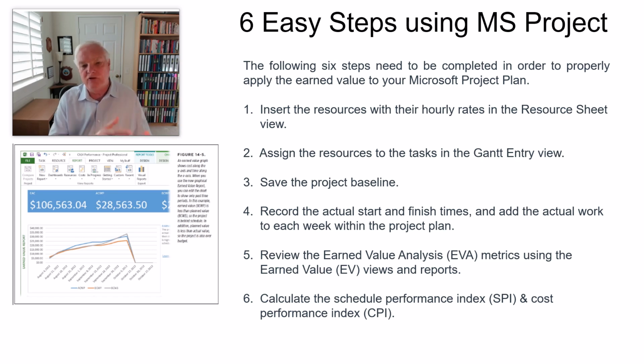Then, as you're moving forward, you record the actual start and finish times of the activities and the actual work to each week within the project plan. That gives you then the ability to review the earned value analysis metrics using the EV views. So you can go to views and you will see an entire series of different earned value views, similar to the graph or the graphic that I've got underneath my picture here.